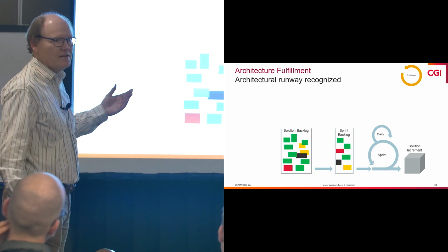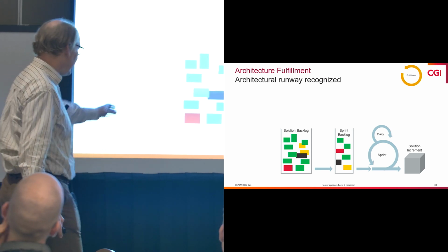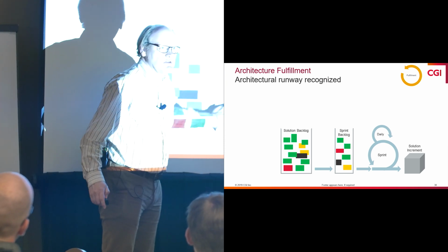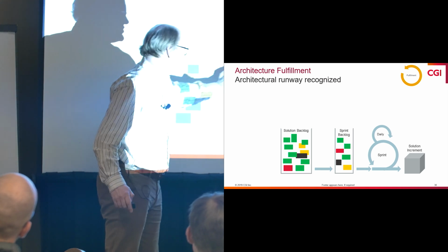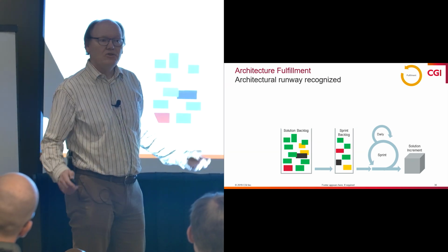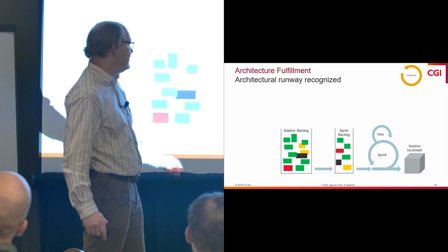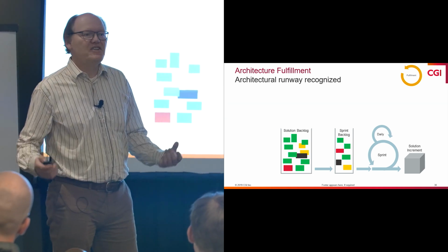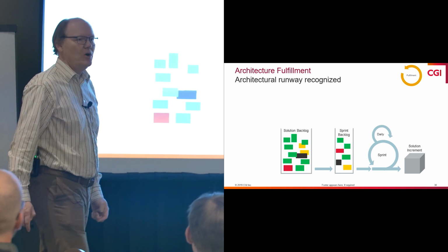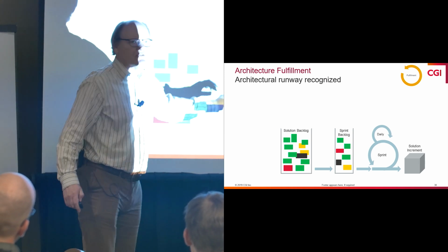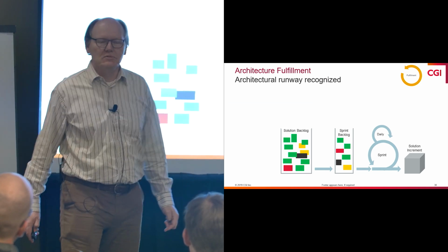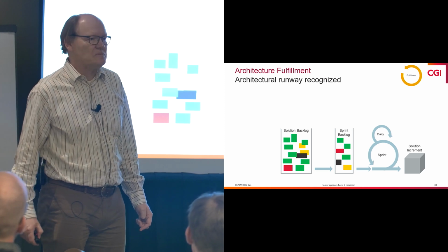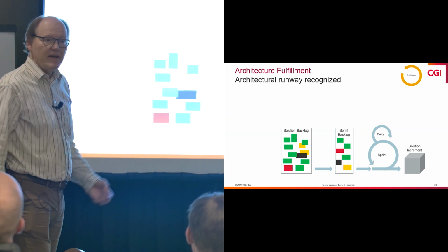So how does this work then in, for example, a Scrum team? Well, we have a backlog with all the colors in there. And we have a sprint backlog, where at the end of every sprint we decide what goes into the sprint backlog. And if all goes well, if you are a mature organization, actually all the colors make it through. If you are a naive agile organization, maybe your product owner only allows the green stuff to go through because they have been taught to prioritize by business value, and only the green stuff has the direct business value, right? So that would be a sign of immaturity.